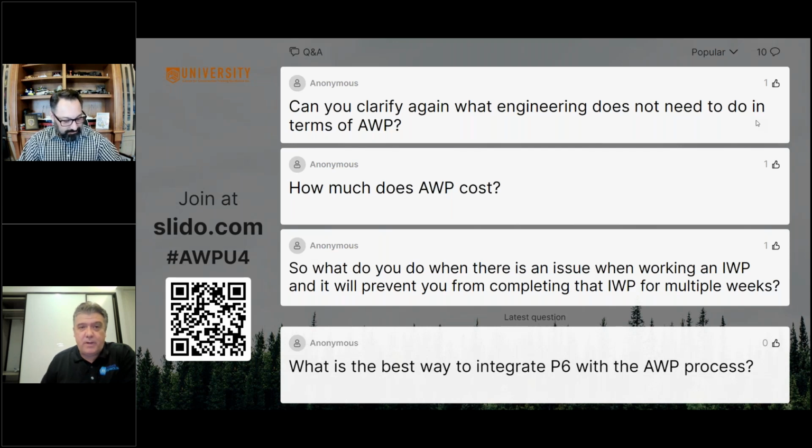It's pretty broad, but I'll go back to a very specific one. Requiring engineering to go in and spend extra engineering hours to put EWP and CWP attributes into a 3D model or on other engineering deliverables is a waste of time. It's not beneficial, and we don't need EWPs issued as PDF packages. We need data.